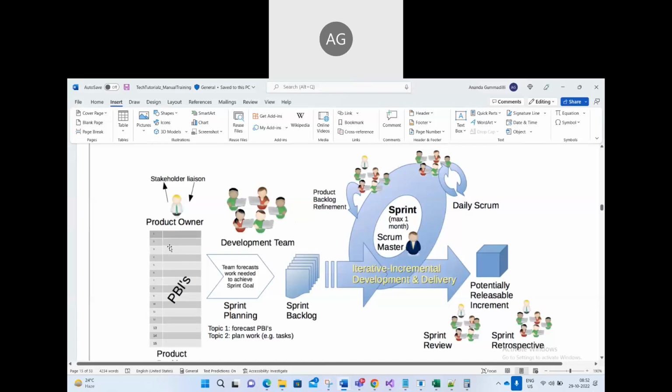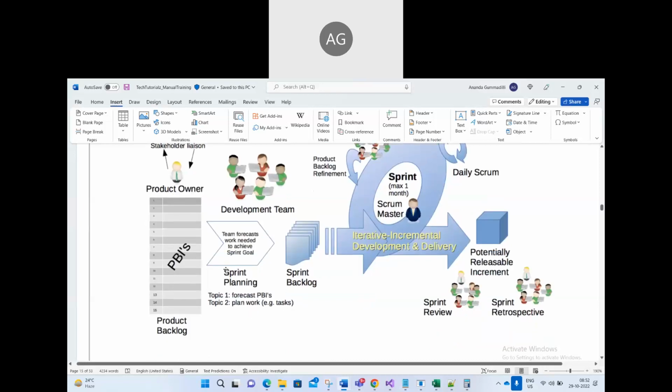Current sprint. Then the sprint planning meeting will happen. Before that, the story pointing meeting will happen, right? In sprint planning, we decide whether these user stories will fit in this particular sprint or not. Let's say we have the capacity of 50 story points for a 2 weeks sprint. The product owner is asking, and there are some user stories. We will pick up 50 story points of work, not more than that. Otherwise, the team will be overloaded. We won't complete the work, right?